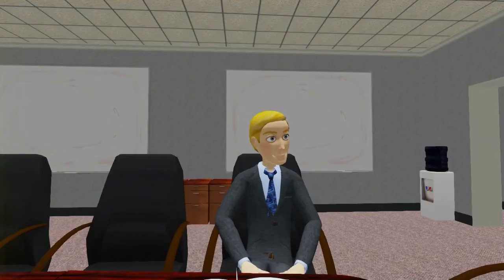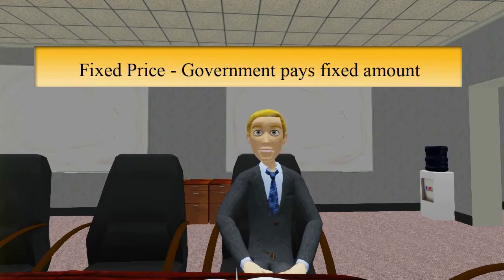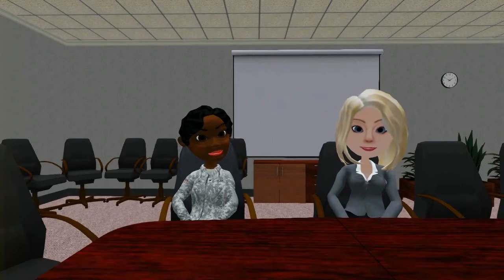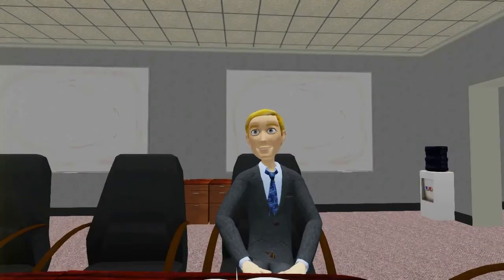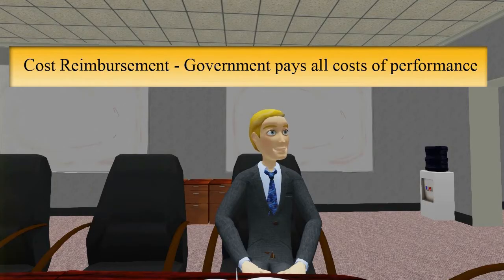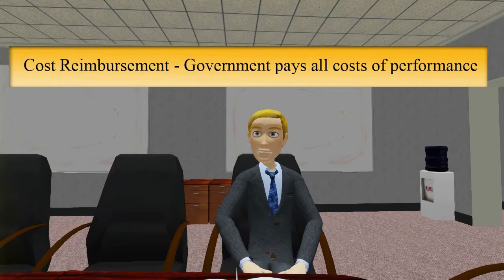Is that really necessary? Yes, because the legal obligation for payment is different for different contract types. Under a fixed price contract, the amount the government is obligated to pay is fixed when the contract is awarded — the government agrees to pay the fixed contract price no matter what costs are actually incurred by the contractor in performing the contract. However, under a cost reimbursement contract, the amount the government is obligated to pay is not fixed when the contract is awarded. The government agrees to pay the contractor basically all the costs actually incurred in performing the contract. In other words, the award of a cost reimbursement contract is a promise by the government to pay whatever it actually costs to perform the effort.